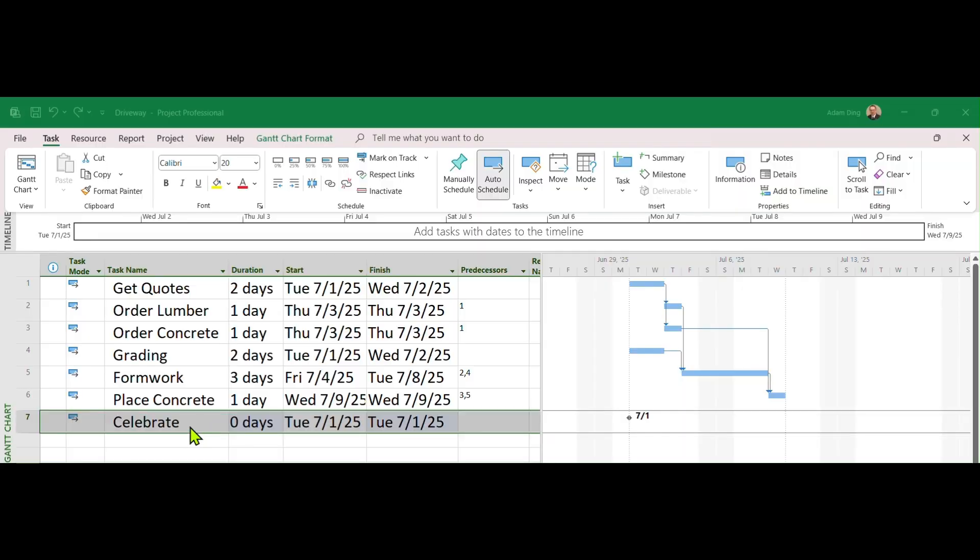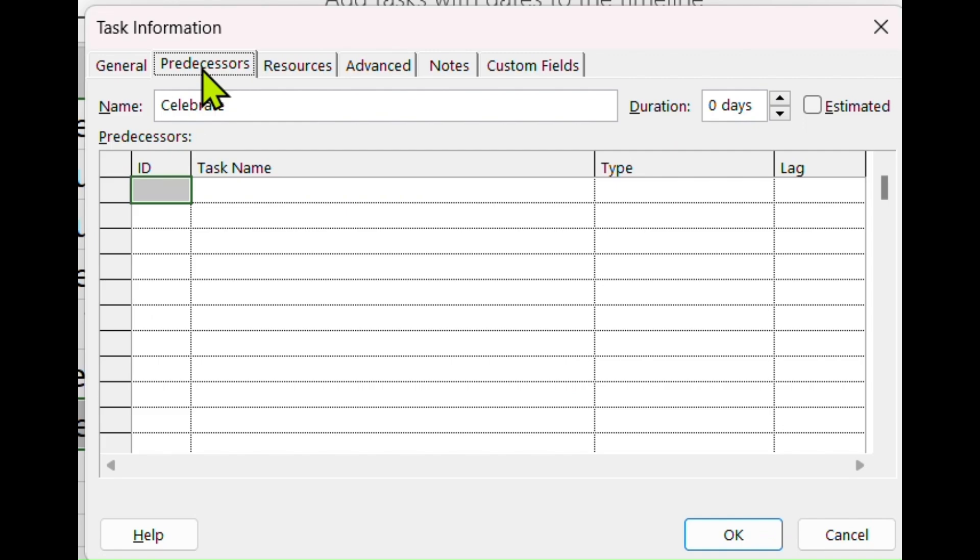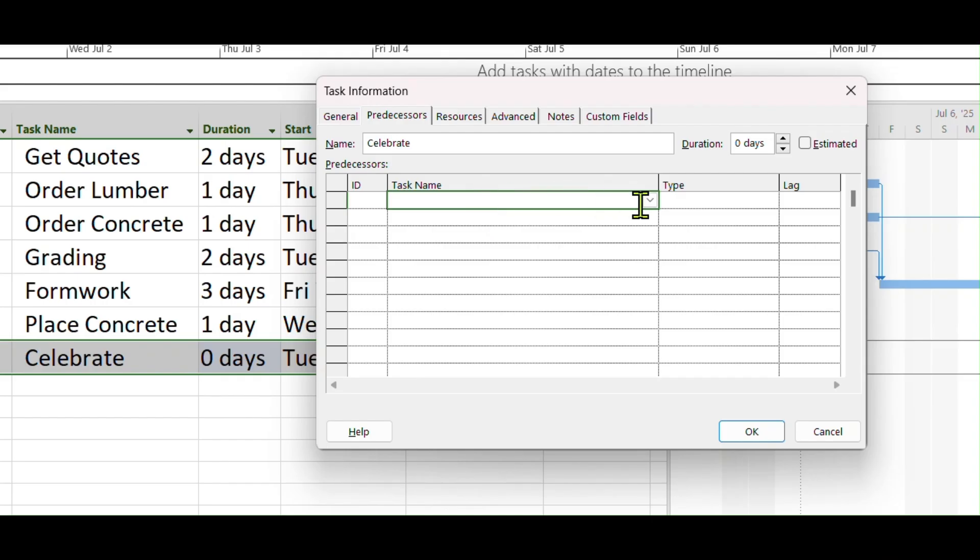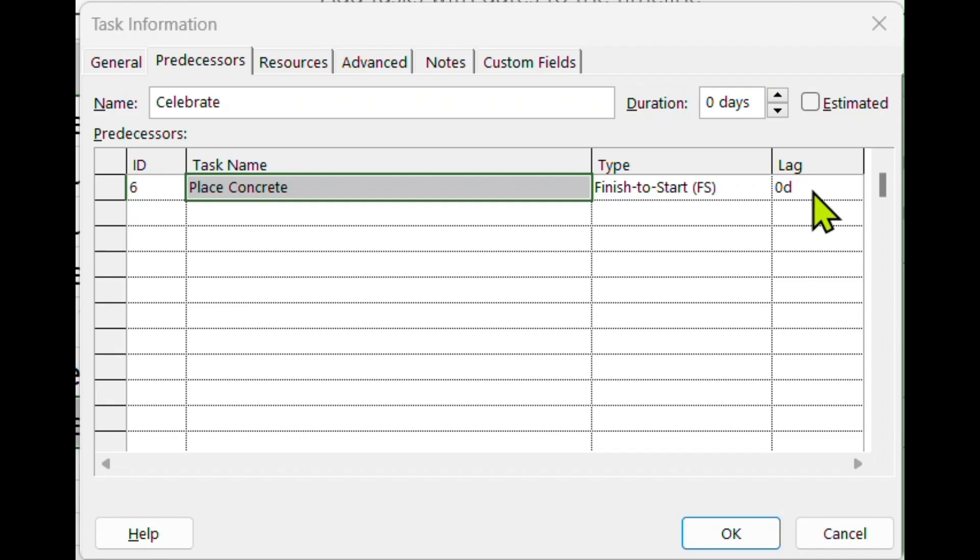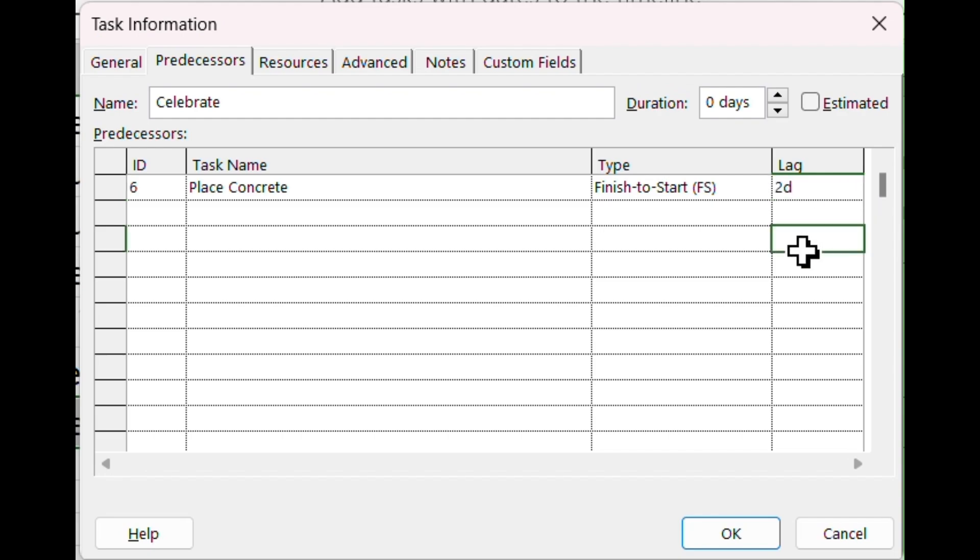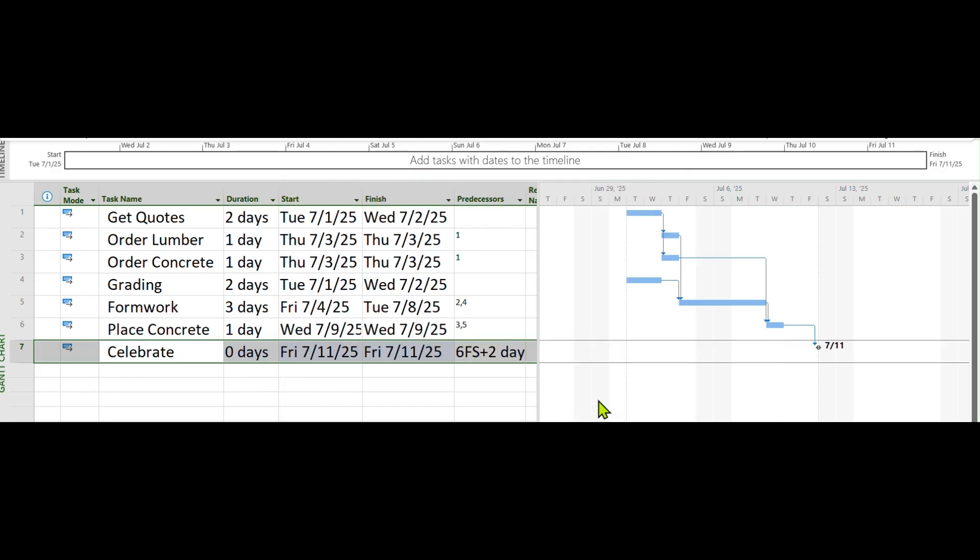Of course this new milestone task should be connected with the current project. Double-click on it to bring up the task information dialog. In this dialog, switch to the Predecessor tab. Select Place Concrete as its predecessor. Put in 2-day lag to allow concrete curing time. Click OK. Now you will see a date, July 11, attached to the milestone task. Remember we started the project on July 1. The current schedule tells you the project duration is 11 calendar days, or 9 working days plus 1 weekend.